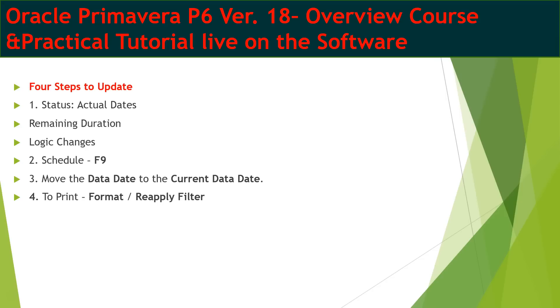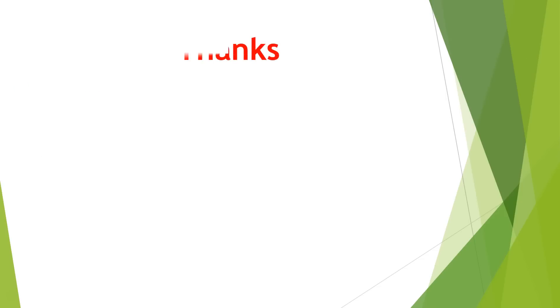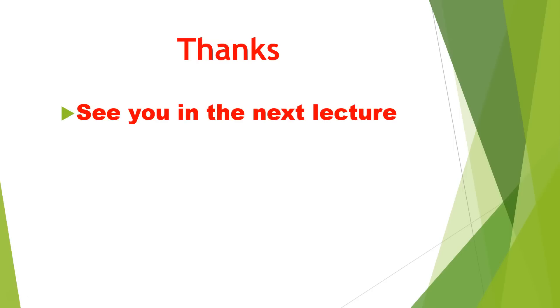Then you move the data date — if you do monthly updates, you have to move the data date every month. After that, you print the layout either in Excel or PDF. I hope you guys like this lecture, and we're going to start next lecture adding this to P6 directly so you can enjoy the course. Thanks so much for watching and see you.